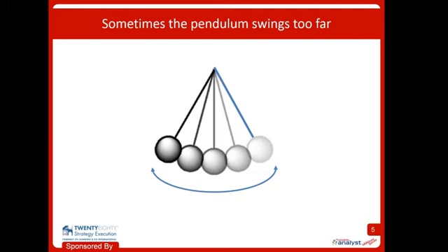One tidbit I'll drop now as a hint to think about is, when you're doing your documentation, think about whether you have done enough documentation that you have reduced the risk so the team can move forward and not have a lot of waste or rework on whatever little increment they're working on. And maybe it's by looking at the high complexity areas in the system, have I done enough on those? So when I talk about doing models, I'm not saying you have to do this on everything, but try and find those areas, high risk, high complexity, and do a bit more there maybe.